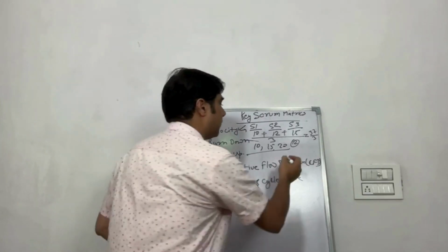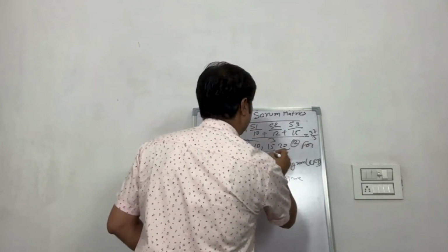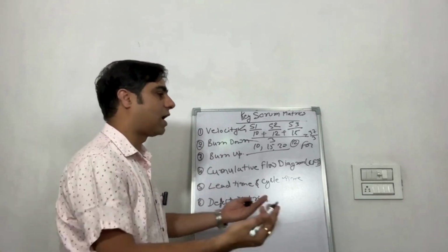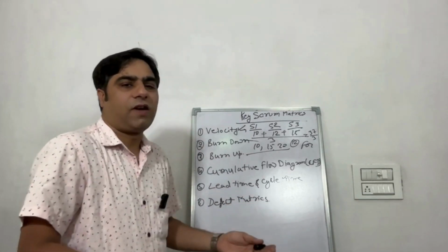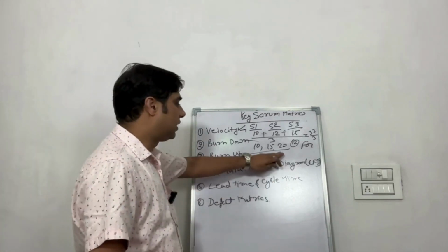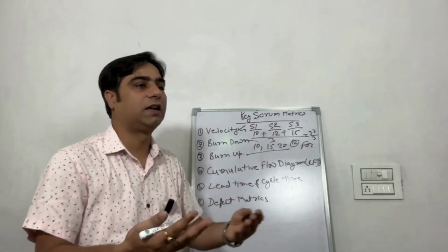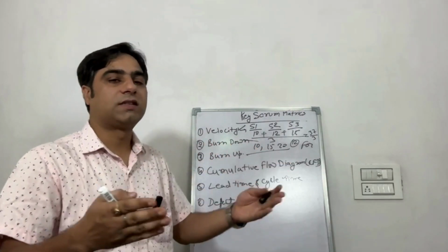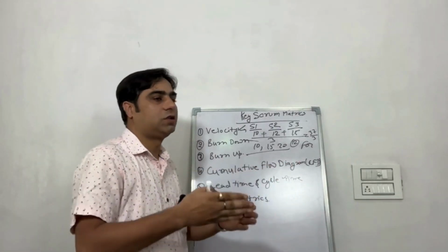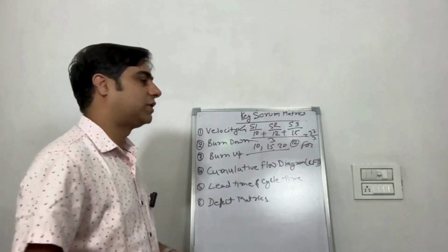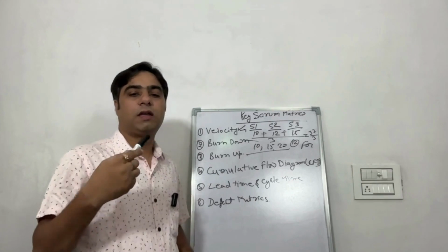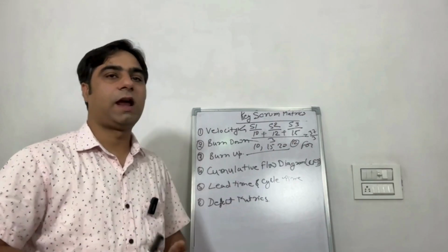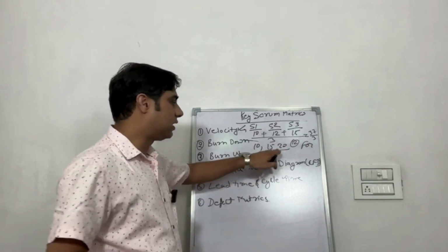Now why do we use it? Basically we use it for forecasting. Let's suppose your stakeholders or your product manager comes and asks what the velocity of your team is. Then you can calculate it and say that we can complete these particular stories, or how many user stories we can complete in a particular sprint. That will definitely help you create the futuristic view of your sprint and the release plan as well.